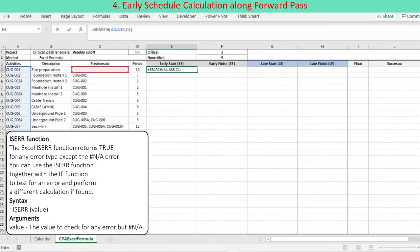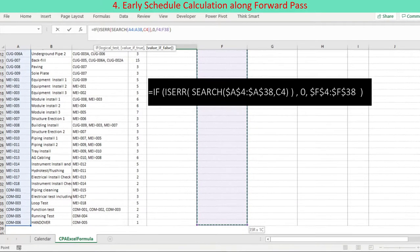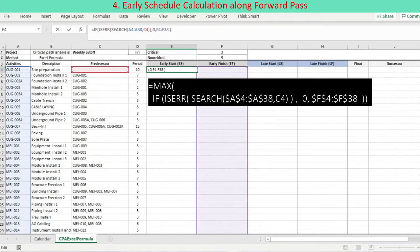If no predecessor is found, an error occurs, which is the case for the project start activity. The error is captured using the Excel ISERROR function. Then the Excel IF function is used to define the value depending on what ISERROR returns. If ISERROR returns true, the activity's start date is not governed by a predecessor and is set to 0 initially. If ISERROR returns false, this means the activity's predecessor is identified, and then returns each predecessor's early finish date. Using the Excel MAX function, return the latest date from the early finish dates of its predecessors.